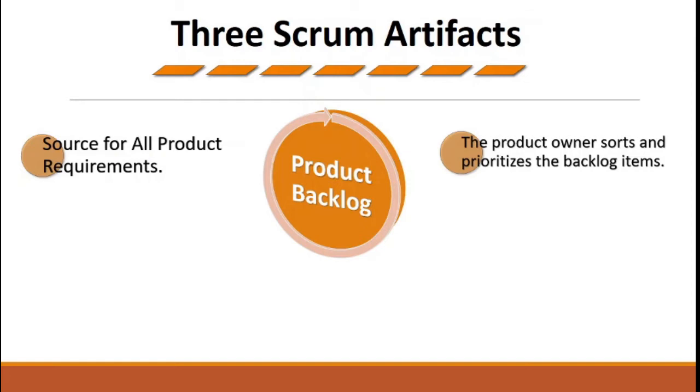It might be a possibility that at this point in time, there's not a lot of risk, but if you do not take it into consideration, then later this can mushroom and it can expand. So that's the reason the product owner picks and chooses which item he is prioritizing based on the business value and the risk that is associated with those requirements.